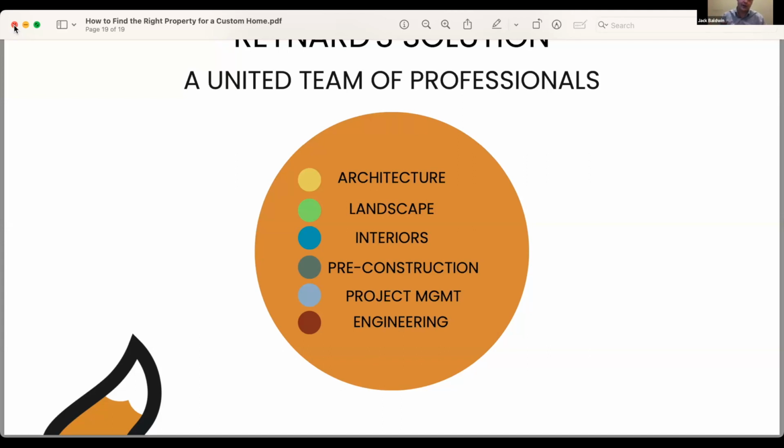The other thing I would do if I was going to help you with a project like that is do what are called as-built drawings. That's an upfront investment from the client as well. They are going to need to get the existing drawings before they do anything. We need to know what we're working with. So that means having somebody come out and measure it. There are a lot of measurement companies out there who will come out for relatively inexpensive and give you just the measurements, and they'll provide them to an architect. But an architect is going to draw up this home, and it's the existing structure. They're called as-builts. Those as-builts are what you're going to use to then create the new vision for the home. So we want that before we start.